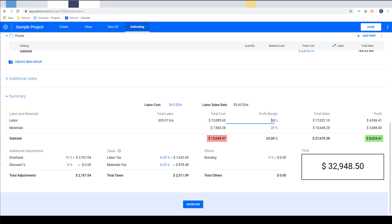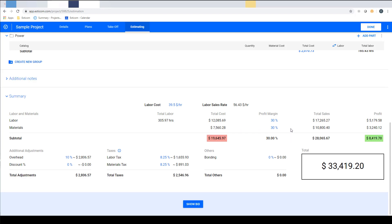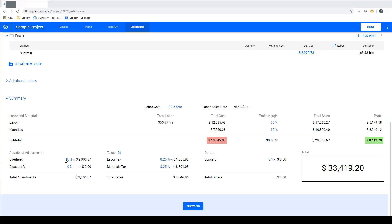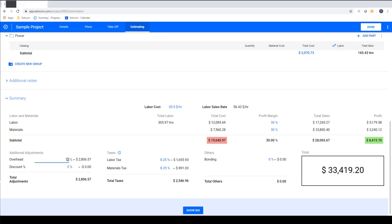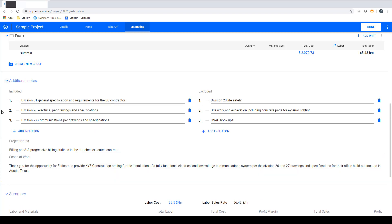To the right you have adjustable profit margin percentages that you can adjust to increase or decrease the sales price of the project. Next you can add overhead and include a discount percentage, taxes and bonding.